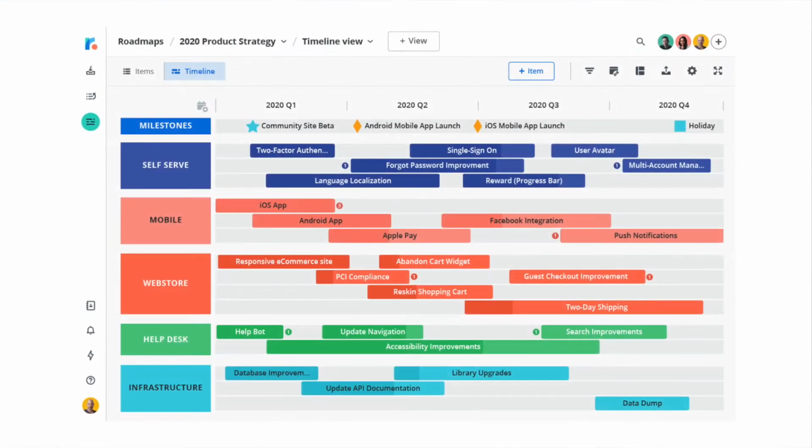Then, once you've defined the project scope, you must now manage time as a constraint. To do so, come up with estimated completion times for the tasks you've laid out in the project scope. And this should also include time for any dependencies with other projects, since their delivery timeline affects your project. And you should compare time with previous project deliveries to better understand the estimates and actual time you need to put in. And once you've done that, create a roadmap like the one you see on the screen to help you visualize how these tasks interact with each other over time.